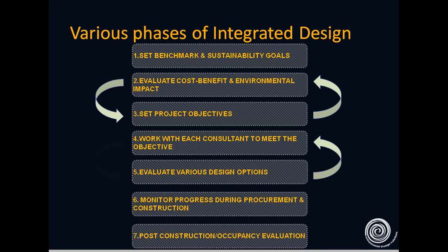This chart basically shows that if you follow the integrated design approach at the very start, the degree of effort in optimizing the design is low and the potential benefit is more. But as you move along the construction timeline, the potential benefit reduces and the degree of effort, both in terms of man days and in terms of cost, increases.